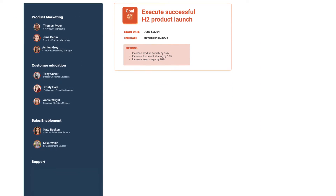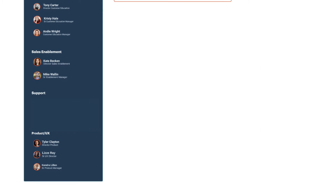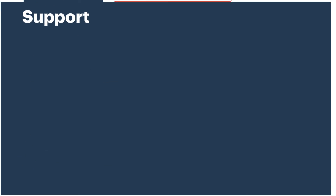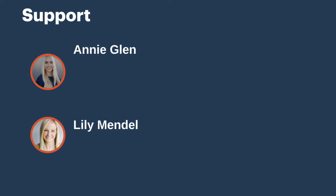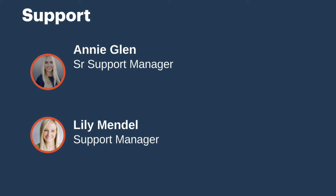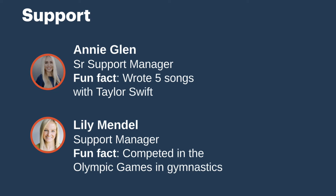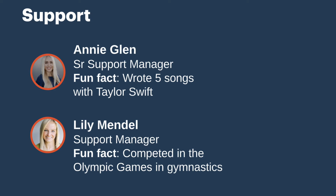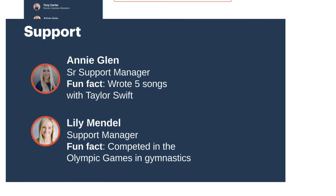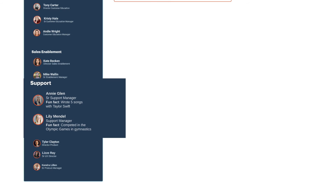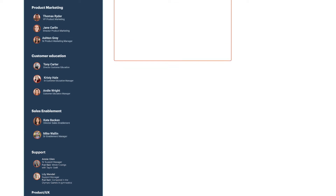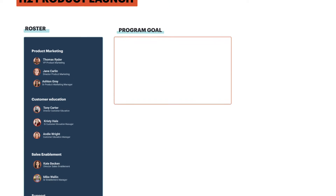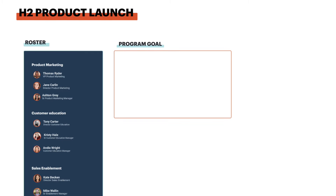Everyone who's included in your team hub should be added to the roster frame. Provide a name, photo, role for the project, and maybe even a fun fact. Ideally, you'll want to provide enough information so that everyone knows who's the owner for each deliverable and process.